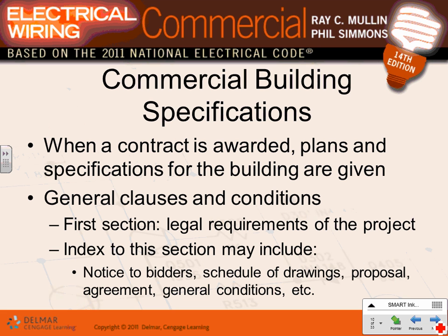Okay, specification. This chapter talks about specification, and there are multiple sections of specification, with the clauses and conditions that come with it. Section number one almost always has the legal requirements of the project. That will be the one that you're going to sign and document, and it becomes the legal document for you.